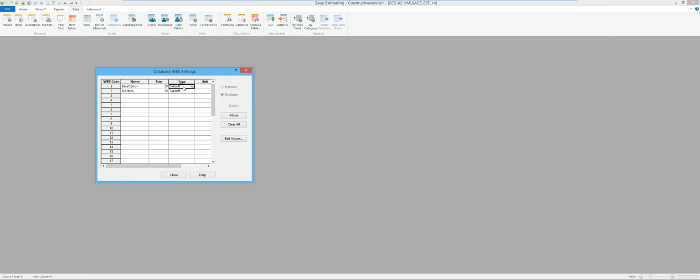Most of the ones we utilize today, most clients are using things that are takeoff specific, meaning they're unique to that estimate. Think of base bid and alternates, buildings, floors, rooms, plan page IDs, details, construction phases, all sorts of different ways that people group data in their estimate presentations. Database ones can be set up on the database ahead of time so it already knows these values. And that's what we're looking at now.